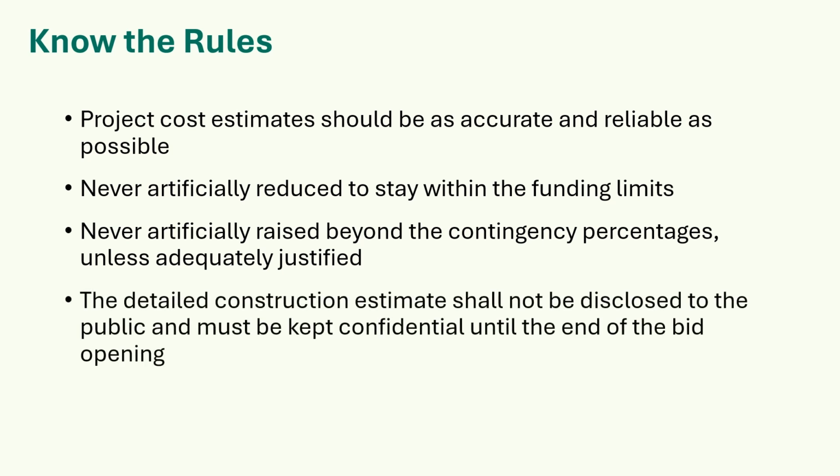The detailed construction estimate shall not be disclosed to the public and must be kept confidential until the end of the bid opening. However, rough cost ranges can be shared. The cost estimating process from planning through PS&E can be organized into 7 steps.